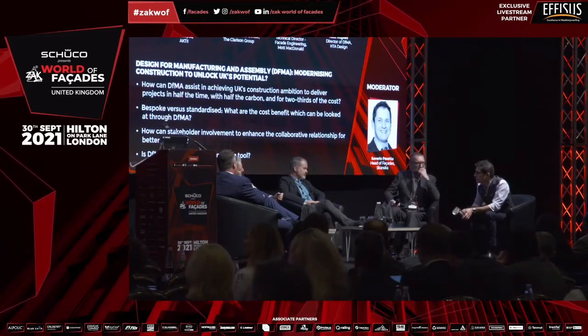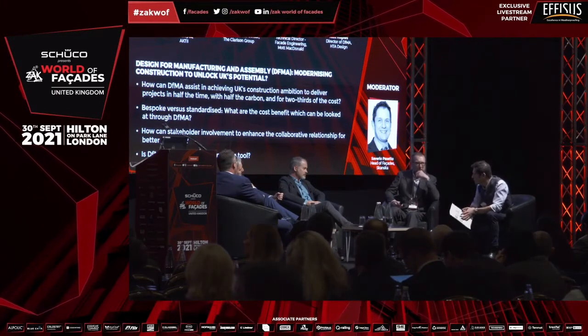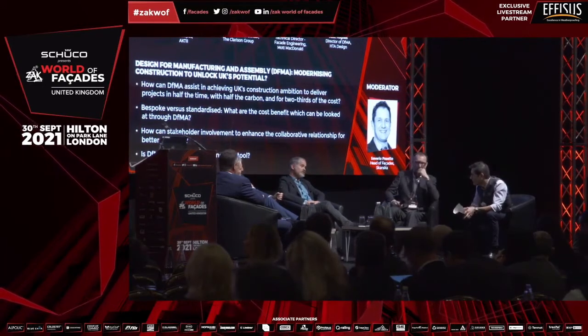Mm. It's interesting because you dropped in the D&B. So is it perhaps, I don't know how we're going to change that, is it perhaps a different form of contract? Do we need to start looking at that? Nigel? Well, I mean, potentially we can. I think that's going to prove very difficult commercially because the fact is clients like that sort of cost certainty that they get from D&B. But of course, I completely agree with Alex. Procurement is a big issue here because D&B really fundamentally prevents us as architects from getting those manufacturers and suppliers next to us during the concept design stage. We just can't do it very easily. So we do need to change that. Certainly some of the more enlightened clients are understanding the value that they get from doing that and are helping to do that.